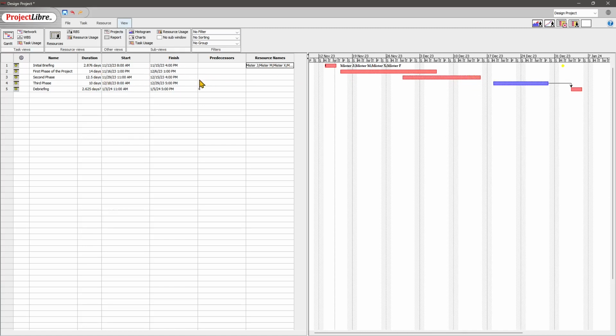Or I can go here and say, okay, now this one here has two predecessors. So it has this one here, which is the third row. So I'm gonna type here 3, and you can see it creates the first arrow. But let's say that it's also this one here. This is another predecessor. So to add another one, I'm gonna do semicolon 4, 2. There you go. So we have these 2 and 4 rows that go right here, and then I can continue with the other part of my project.